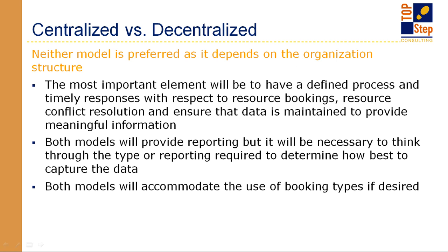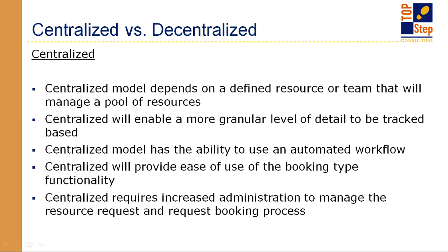So in a centralized model, as I mentioned, that's typically when you have someone managing that pool of resources. And it does have the ability to use an automated workflow using the booking request. I don't know if anyone's familiar with that. We'll walk through that briefly inside the tool. That is the type of automated workflow you can use if a project manager requests a resource, then someone can fulfill that resource request.